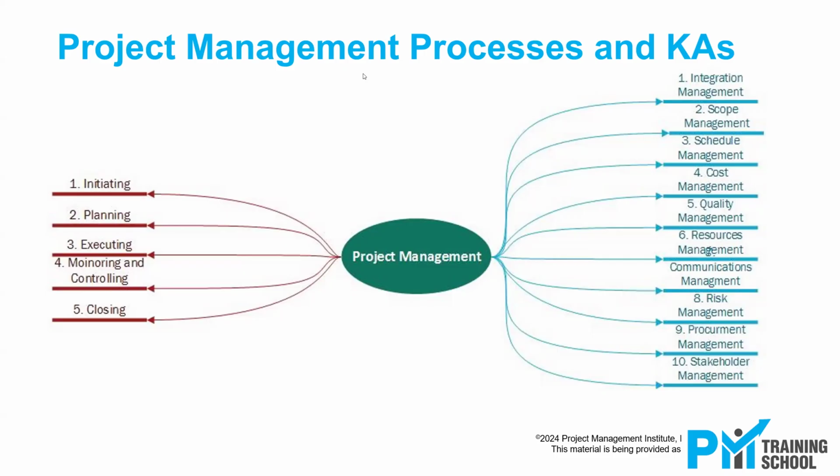Okay, when a phase is completed, and you see, every phase is like a mini project and it has some product at the end of it. So I would consider every phase as a project, and in every phase, I may be applying all or some of those 49 processes. I might be using in every phase initiation, planning, execution, monitoring and control, and closing.